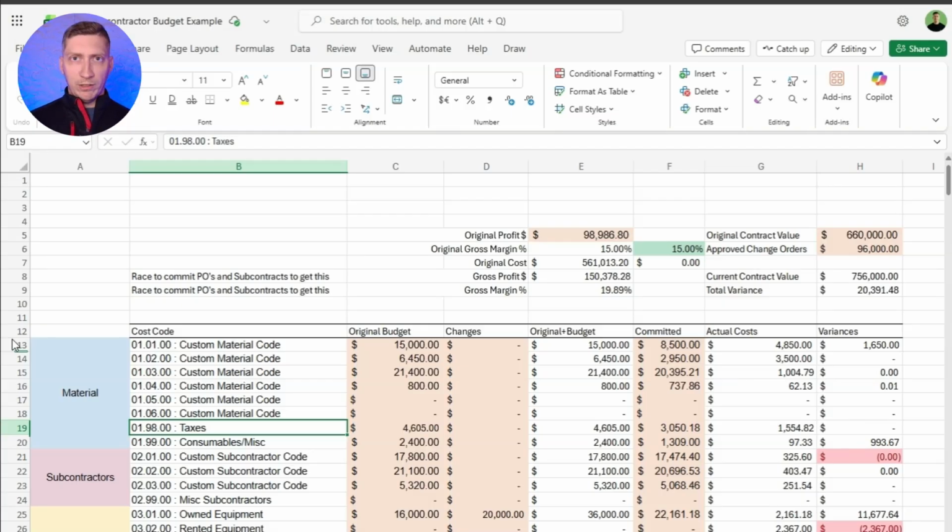It's easy to do that when it's one lump sum, but basically what we found is it was taking twice as much time and 1.5 times the material we thought to build that project on the first 10%. And so I did a site visit, talked to the superintendent. What was happening? Why would it be over by double? That's insane. Like, we've done this forever. We've done this for 30 years. It's not like things changed all of a sudden. But what happened is, because we were in a swamp and the spec called for a certain amount of compaction, we had to try to meet that. And so it was either too wet or not compacted enough.